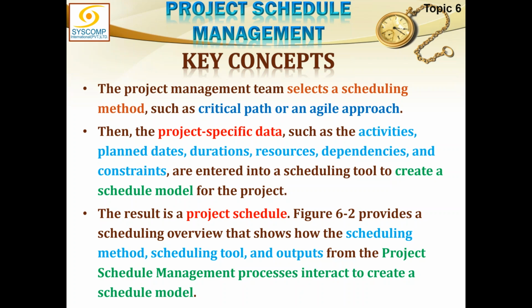So we cannot amend it until and unless there is a proper change request processed through integrated change control, and ultimately that change is allowed. This change request is approved, and requisite changes are made to the project management plan and project documents. But once we open this Pandora's box, the project related data would start fluctuating, because with these changes many possibilities open up, like what if this happens and then that happens. So this data again becomes fluid, and it starts changing, and again many instances start getting created.